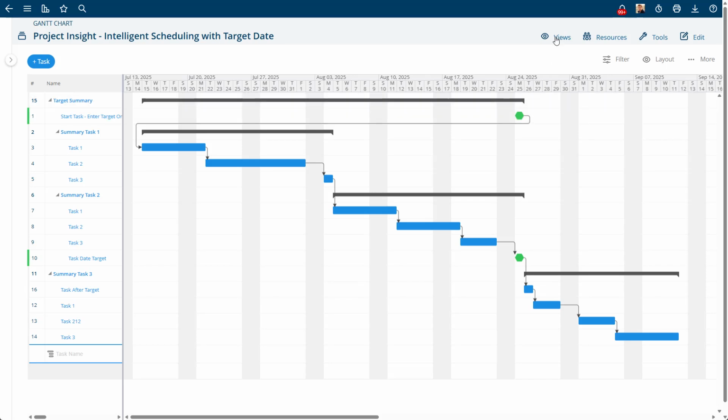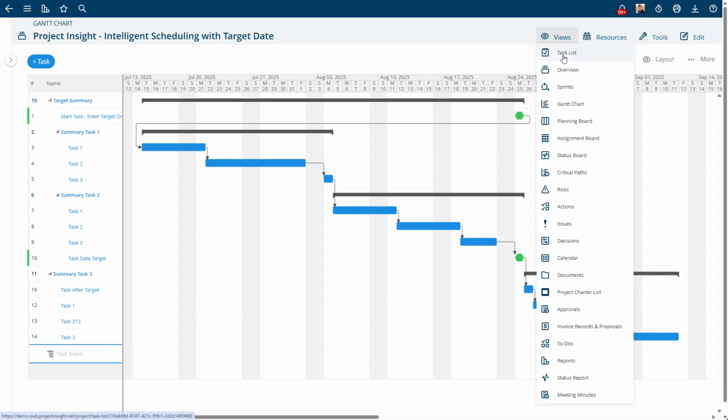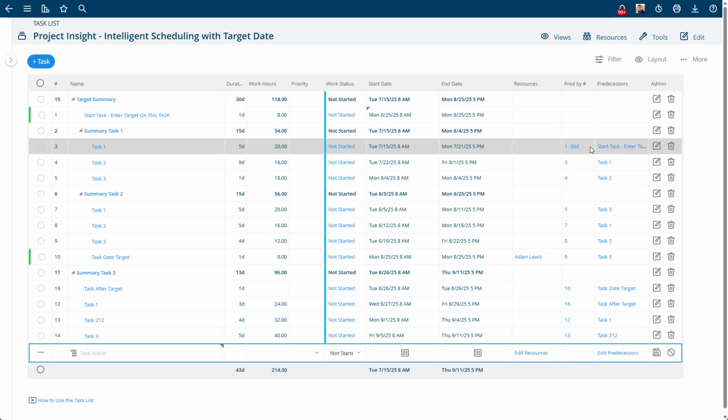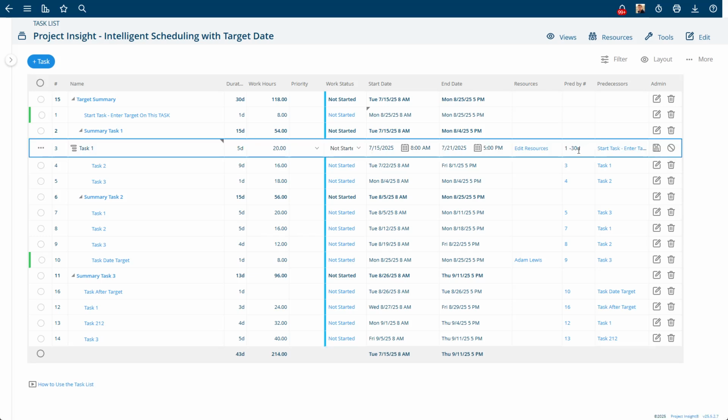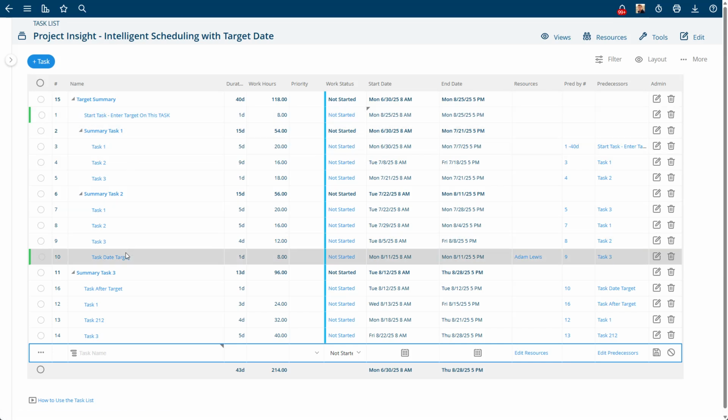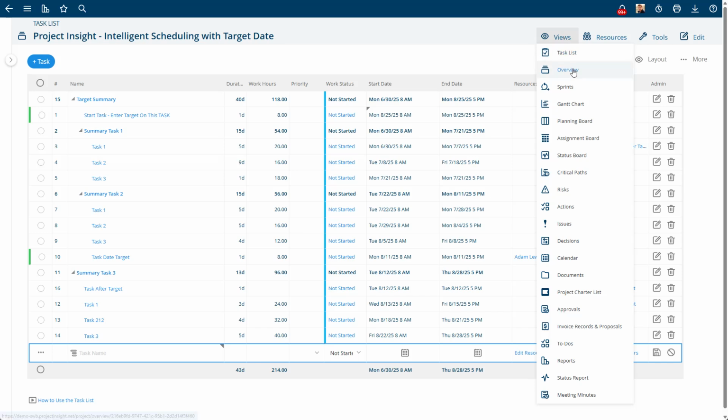And it works by setting a lead time. So if the duration of these tasks takes longer, you'll just change the lead time. So this could be 35, 40 days. And what we're saying is just put the target date right here, and then these tasks will always land on the same time.